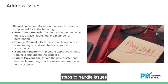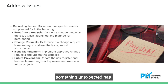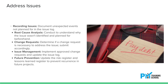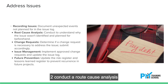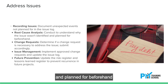Steps to Handle Issues: 1. Something unexpected has happened that was not planned — it should be recorded in the issue log. 2. Conduct a root cause analysis to understand why the issue wasn't identified and planned for beforehand.